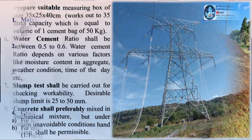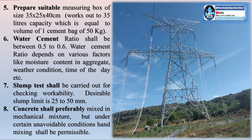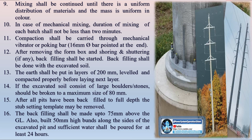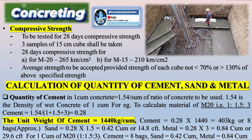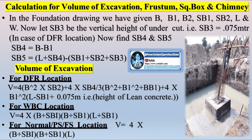The timing of the soil investigation is important because the results directly influence the foundation design and construction schedule. If the soil investigation reveals problematic conditions — such as soft soils, high water tables, or areas prone to erosion or landslides — the design of the transmission line may need to be modified. By conducting the soil investigation early in the process, engineers can address these issues before construction begins, avoiding costly delays and redesigns. The soil investigation also helps identify seismic risks, and in earthquake-prone areas, special foundation designs may be required to ensure that the transmission towers can withstand seismic forces.